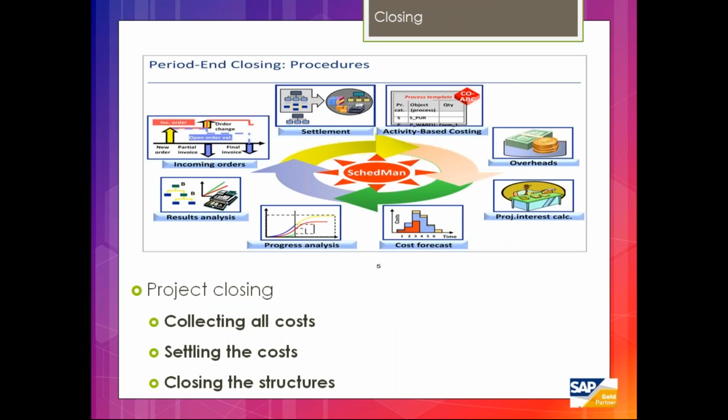Then we do the period ending process. Okay, first we'll do the progress analysis, cost forecasting. Okay, then we do the result analysis. Then we do the settlement process.